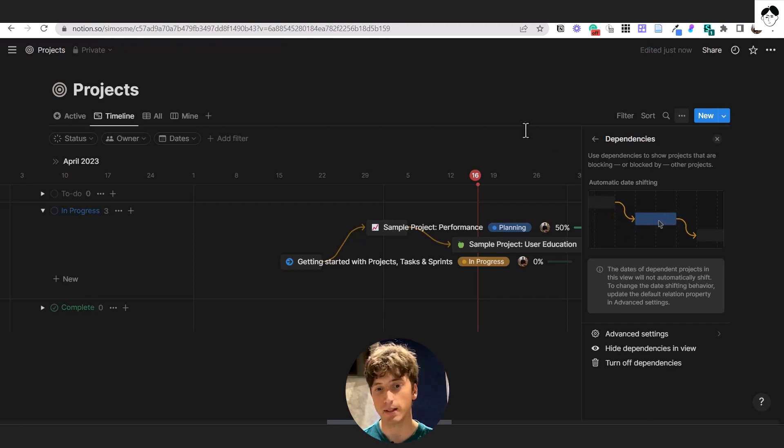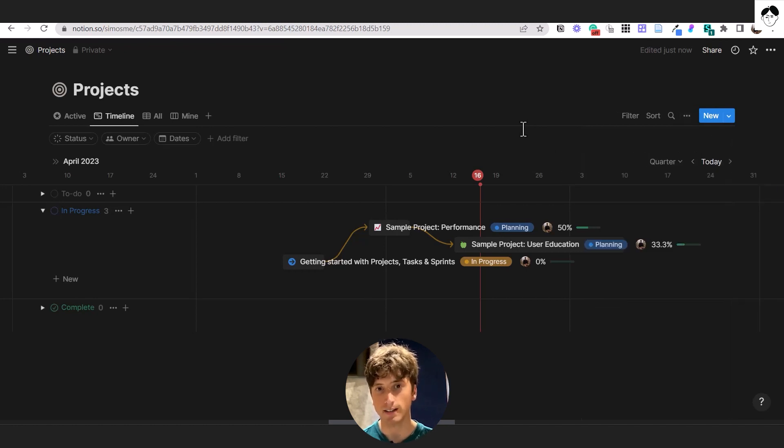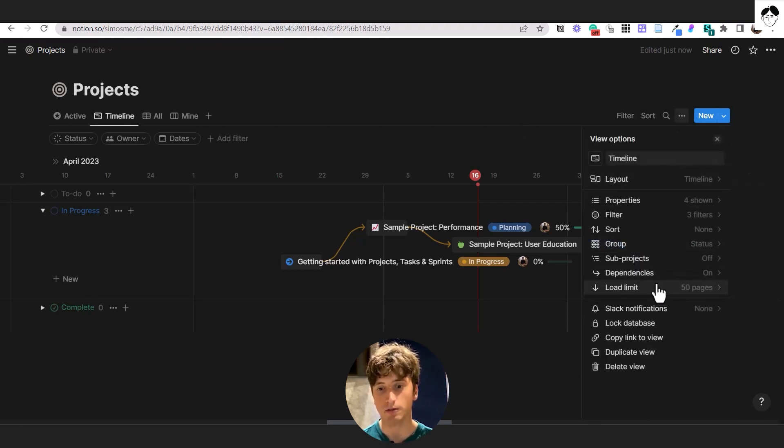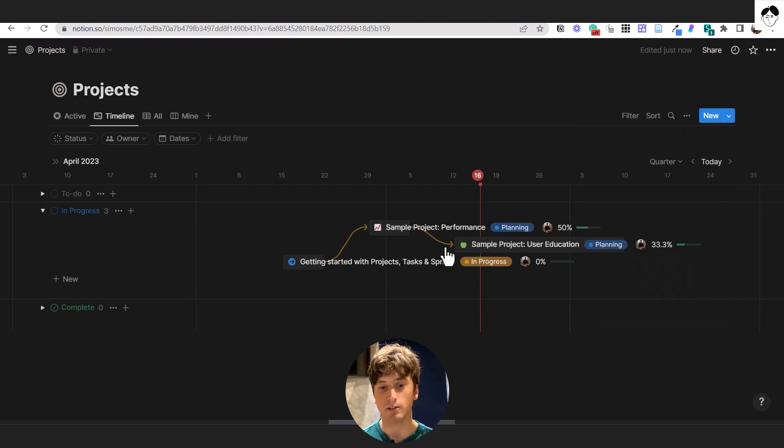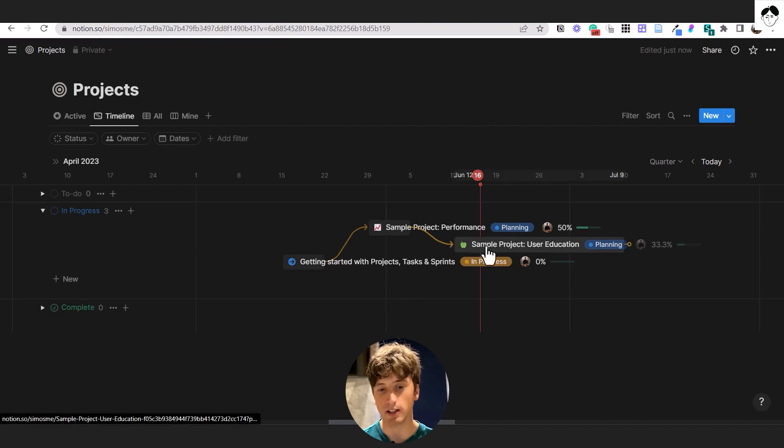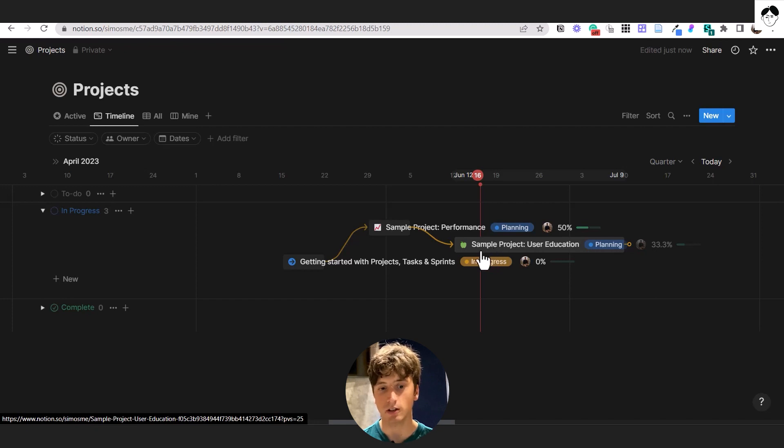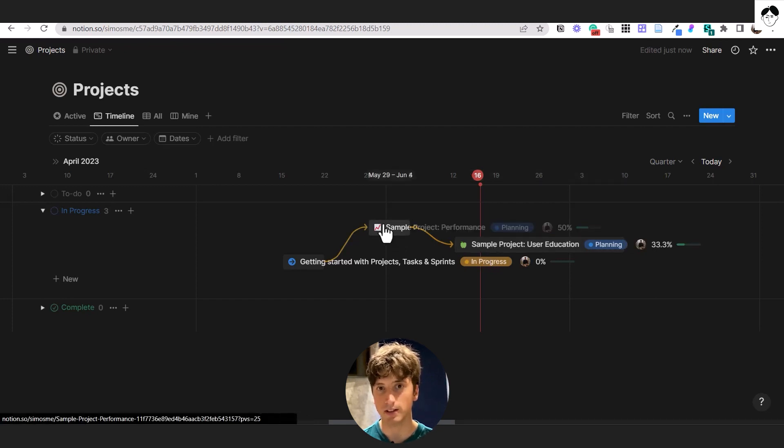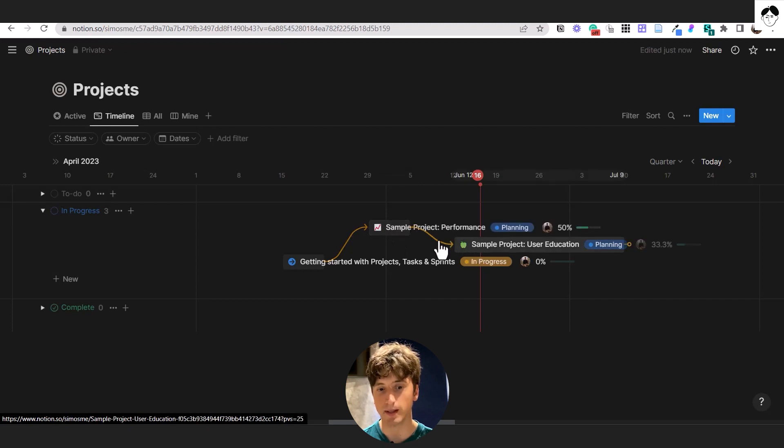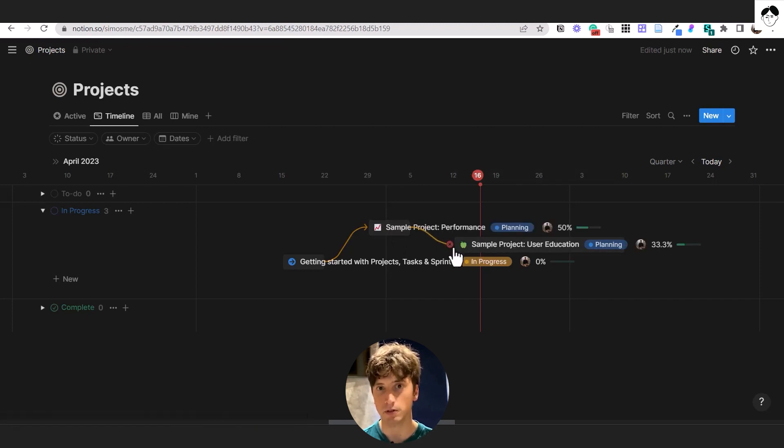You can visualize dependencies on a timeline view when you activate them from the three dots here. Dependencies, and you can turn them on. And you can visualize them on a timeline view just like this, where you would see in this case, I can't start sample project user education unless sample project performance is finished, because there is a dependency between those two.